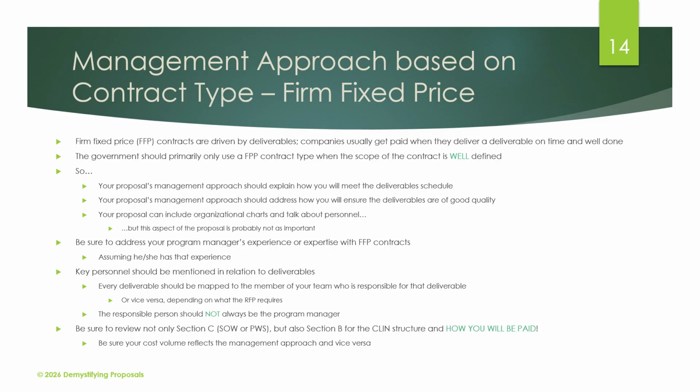And then again, be sure to review not only Section C, but also Section B and how you will be paid. I can't emphasize this enough. In Section B, in the CLIN structure, they will talk about how you will be paid, and you have to be sure that your cost volume and your management approach and your technical approach all reflect the CLIN structure and each other.